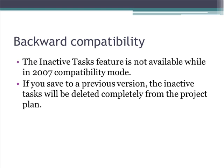Lastly, inactive tasks feature will not be available if you are working in 2007 compatibility mode. And if you save a project file in the previous versions, the inactive task will be completely deleted from your project plan.